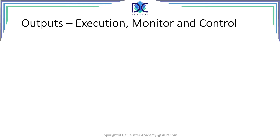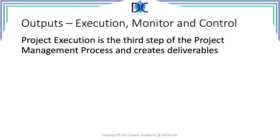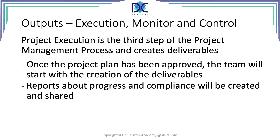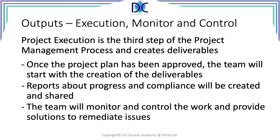For the outputs of execution and monitor and control, we look at the creation of the deliverables. Once the project has been approved and the plan accepted, we can continue with execution — though it's not always the case that we have permission to continue. Assuming our plan was good, we have good baselines and a valid business case, we start creating those deliverables. We also report on progress and compliance — that's the monitoring and controlling part. We share that information with stakeholders and use it to evaluate the progress of the project. The team monitors and controls the work and provides solutions to remediate issues.